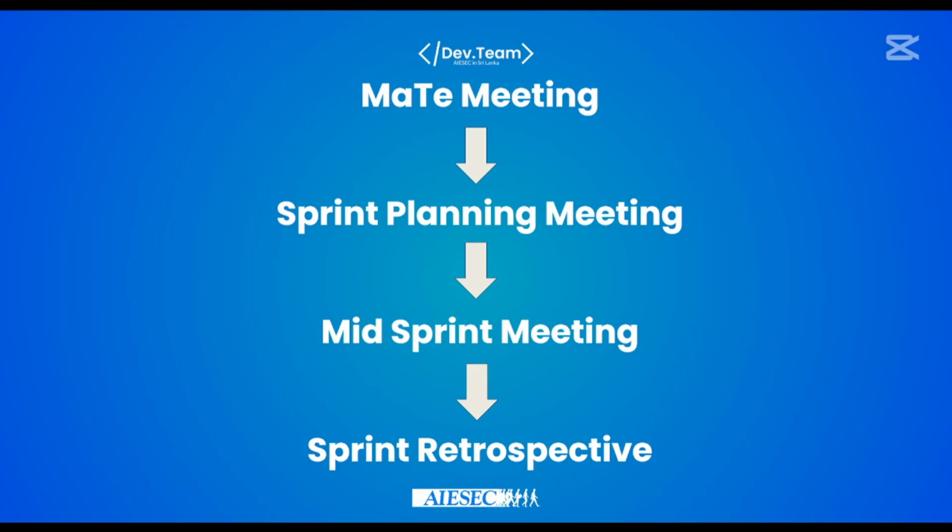In the next weekend, you have to hold the sprint planning meeting, right? There what we basically do is plan the tasks that we have to complete in the next 2 weeks. So we need to assign them to members and keep all the tasks in the backlog, right? This is very important. In the to-do list, all the tasks must be there before Monday.